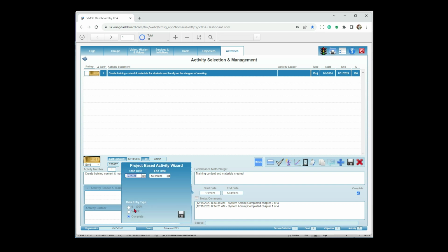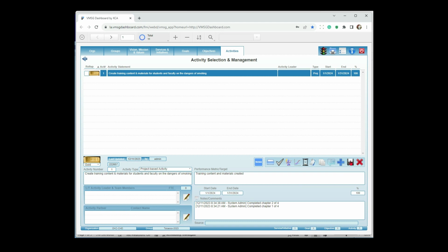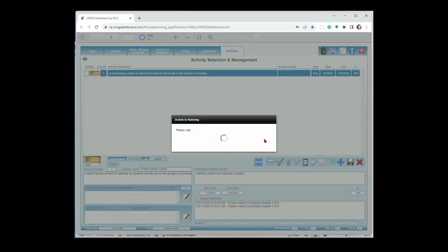The other option you see here is yes, no. Some activities you'll find can be answered with yes or no. If you do that, it's going to give you another checkbox over here. Yes, and yes is 100%. Unchecked or no is 0%. So it just gives you those options in there. Save that. Okay, now the next thing we're going to do is assign a team of people